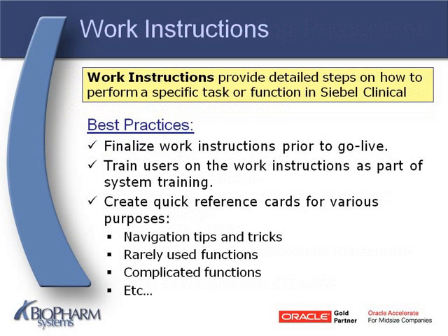Let's move on to work instructions. Once your SOPs are in place and any Siebel Clinical customizations or design changes have been finalized, it's time to create work instructions for your users. The work instructions should be finalized prior to go live and also should be included as part of your user training. They serve as step-by-step guides on how to perform standard functions in Siebel Clinical and will ensure that everyone is doing things in the same manner.